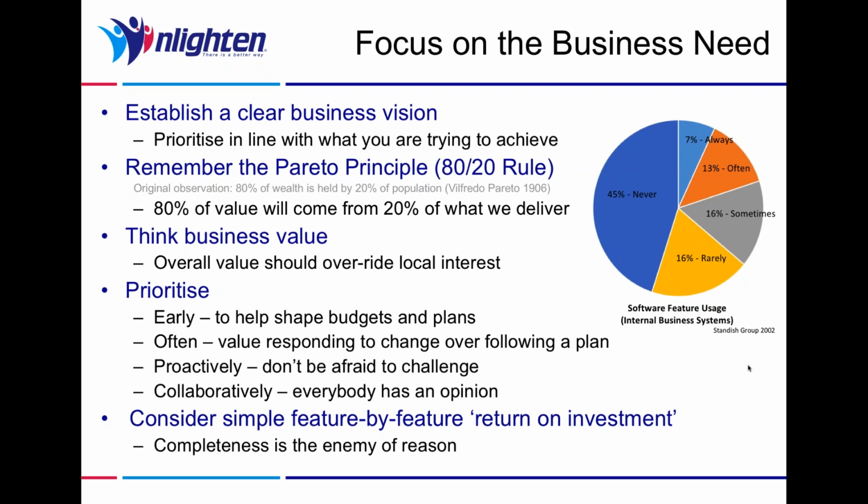determining what's most likely to be delivered as part of the feature set and what's perhaps going to be dropped in order to protect time, budget and predictability. So to do this, we prioritize early. Early prioritization helps us to shape budgets and plans for our project.